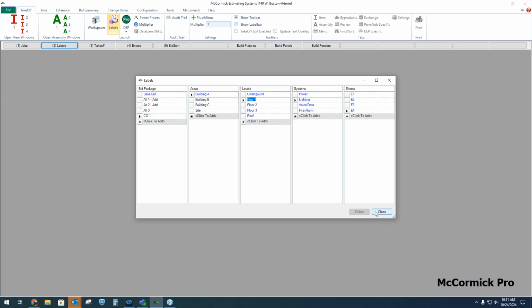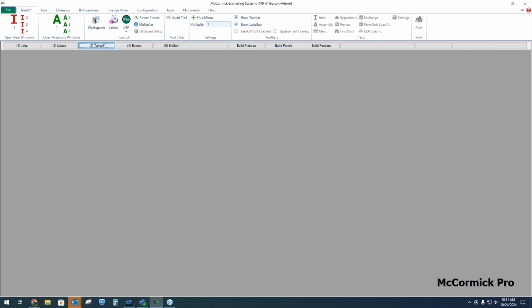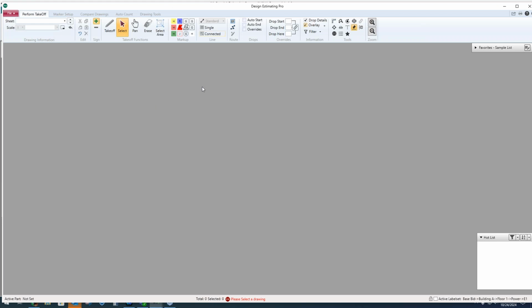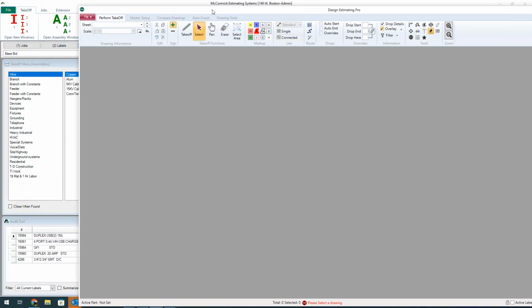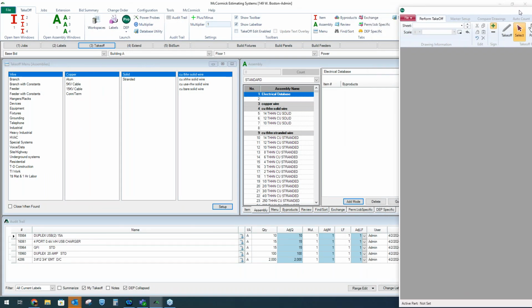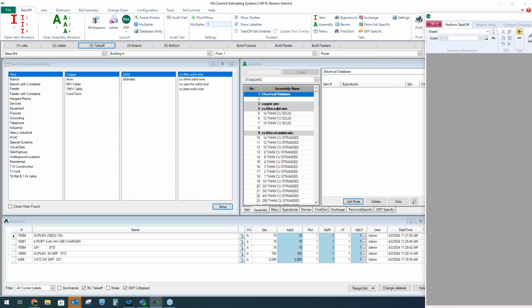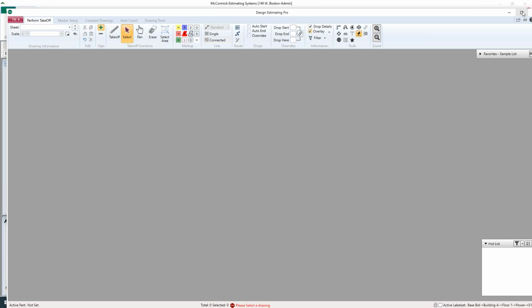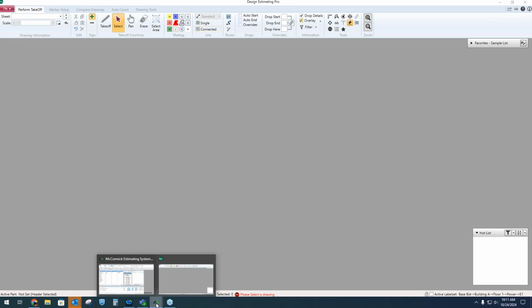Now, in the takeoff portion here, step 3, this is where we account for the material. Now, I have drawings attached to the job. So I attached them in the first step here. So I would launch those from the ribbon here in Takeoff. If I have a separate monitor, I would put the plan full screen on a separate monitor. So that's highly recommended. I can only show one screen at a time today, so I'm just going to toggle between the two screens, between the estimating screen and the on-screen Takeoff.